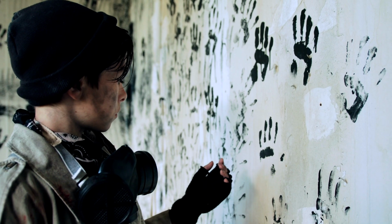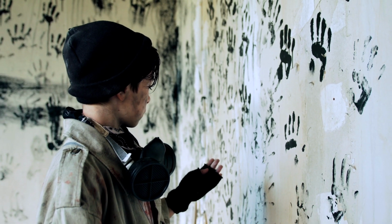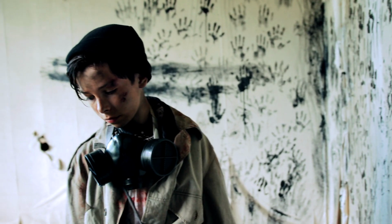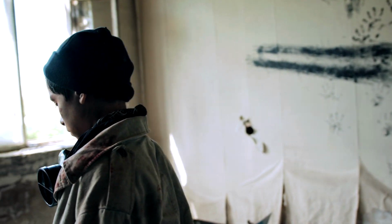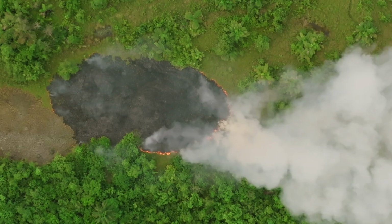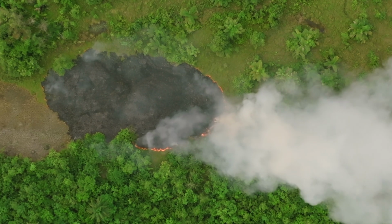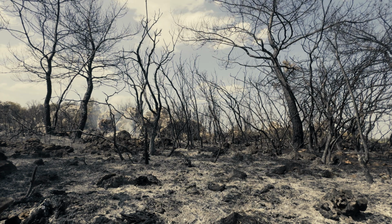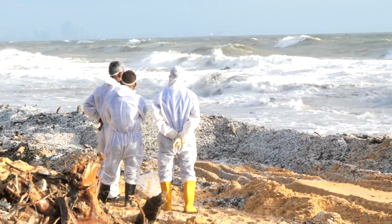However, economic concerns led to unapproved construction of an access road for emergency vehicles during the project actions, which affected 3 archaeological sites. This triggered compliance requirements under the National Historic Preservation Act, NHPA, due to damage to archaeological resources based on the ground disturbing activities. ESA and NEPA also had compliance concerns which further increased the complexity of the project due to potential ecological impacts.